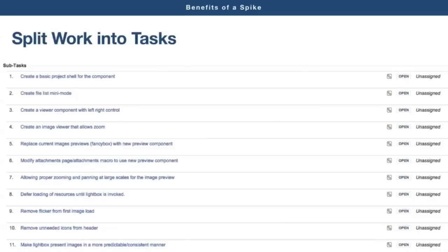One thing that we started doing originally was dedicating half a day before the planning meeting exclusively for spikes. So we knew which stories would be scheduled next in the planning meeting, and we would ask people on the team to actually spike those stories beforehand. And again, we plan and schedule spikes as normal tasks in a sprint. So when we are going to the planning meeting, we're dragging spikes into the planning.